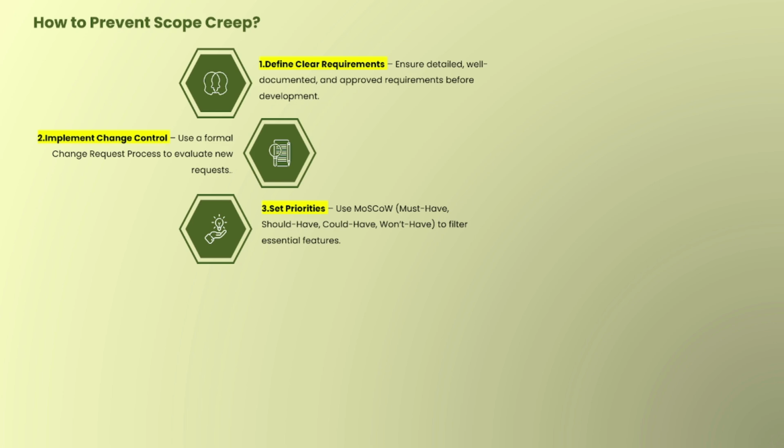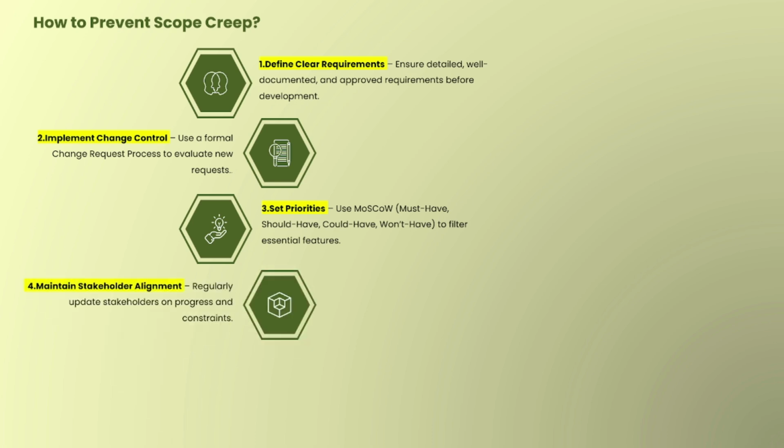So what exactly I'm trying to tell you is that when any change requirement comes, we put it into the MoSCoW frame and see whether it is really required or it is just some nice to have stuff in the project. If it is nice to have, we'll definitely say won't have, because it's not that much required.